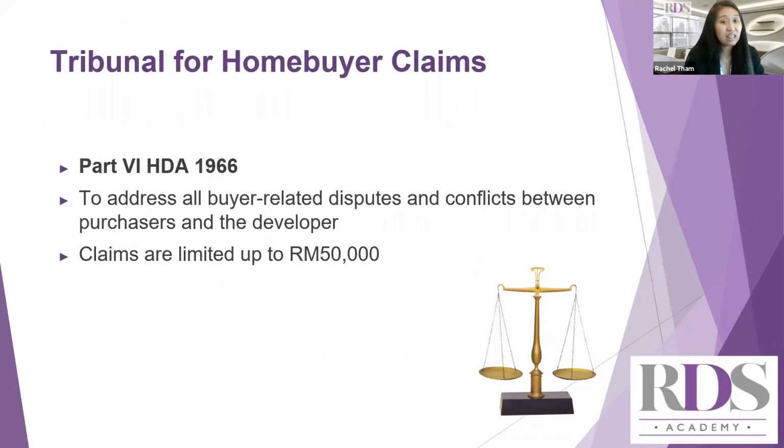So now let's see part of the HDA 1966. Section 16(b) of the Act has stated the establishment of a tribunal, known as the Tribunal for Home Buyer Claims, which was set up to enable home buyers who have difficulty getting developers to repay their house to submit a claim to get quicker and cheaper solutions. The proceedings before the tribunal are open to the public.